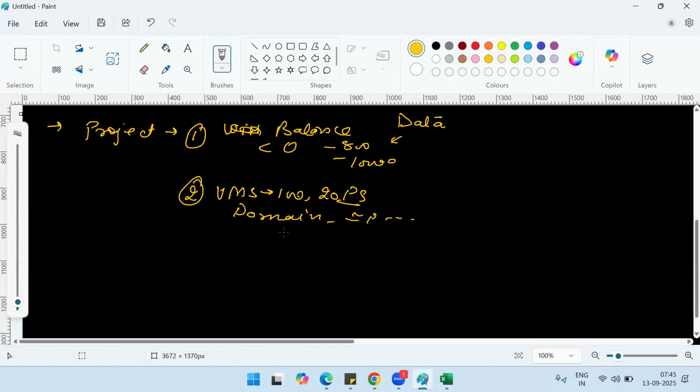But if I just go back to use case number one, I think it depends on the scope of the issue or the use case. If it's a broader issue, like if it broadly affects the project timeline or budgeting in a way, then definitely EA will be involved. But if it's a smaller change, like for example, changing the field type or something like that, which is more technical and doesn't cause any scope creep, like if there is no change in the scope of the project, then I think EA should not be directly involved.